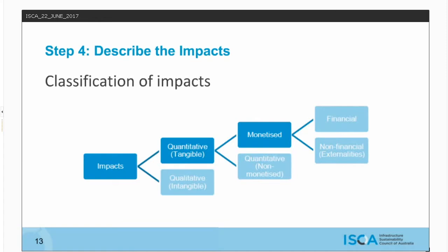If some externalities to your problem or opportunity are really significant, then consider obtaining or undertaking modelling or survey work to identify externalities specific to the impacts of the options. Estimate the quantities of the externalities in physical terms and then value the externalities. When valuing an externality, the aim is to find out how much the affected people are willing to pay to avoid the externality, or how much they are willing to accept to put up with it. There are a lot more details on the techniques in the how-to guide.